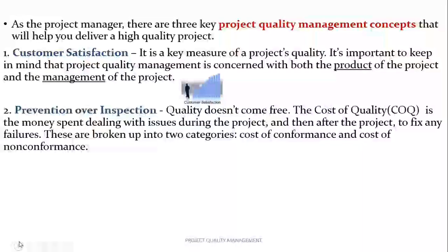Second is prevention over inspection. Quality doesn't come free. The cost of quality (COQ) is the money spent dealing with issues during the project and after the project to fix any failures. These are broken up into two categories: cost of conformance and cost of non-conformance. Cost of conformance includes preventive cost, and cost of non-conformance includes internal failure cost. So quality is achieved by planning, designing and building it into a product or processes from the inception.